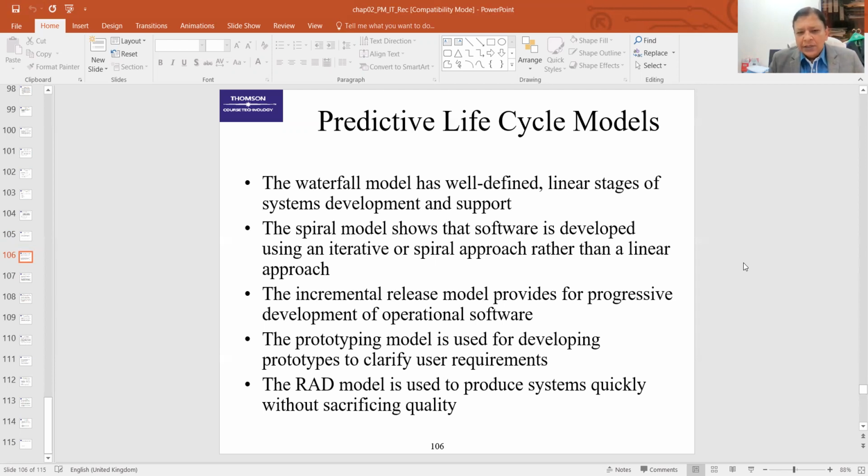RAD methodology has several advantages. Rapid application methodology is introduced to develop small and medium projects. We can cover more complete user requirements because we are using prototype heavily at the modeling level and at the construction level. But because of that, there are some drawbacks, because RAD methodology is not suitable for large projects. It's not suitable for safety critical projects where human life risks are involved, and we use waterfall methodology at that level or for such projects.